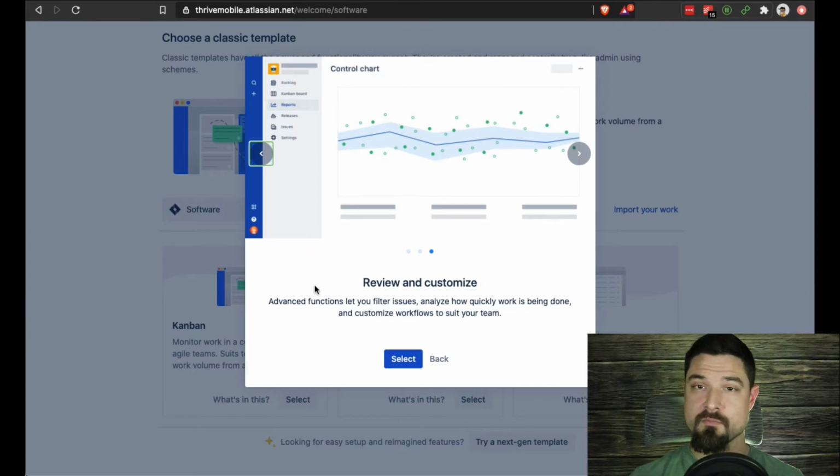Kanban is a great method when you have a smaller team and you're working on a generally smaller product and you're basically ready to release at any point. I typically end up on a team where we use Kanban for products that we've launched and we're in a maintenance phase at that point.